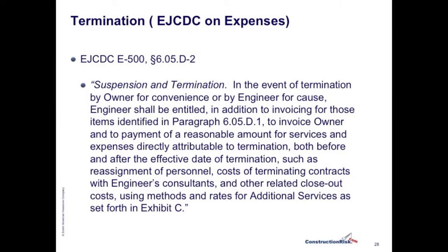The EJCDC E500 has a clause that reads as follows, quote, "In the event of termination by the owner for convenience or by engineer for cause, engineer shall be entitled, in addition to invoicing for those items identified in preceding paragraphs, to invoice the owner and to receive payment of a reasonable amount for services and expenses directly attributable to termination." And it goes on from there. Close quote. The AIA deals with termination expenses a little bit differently.